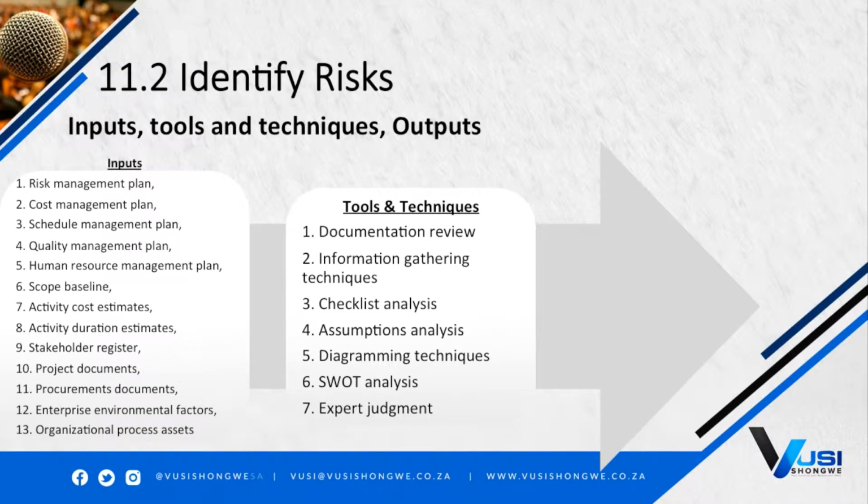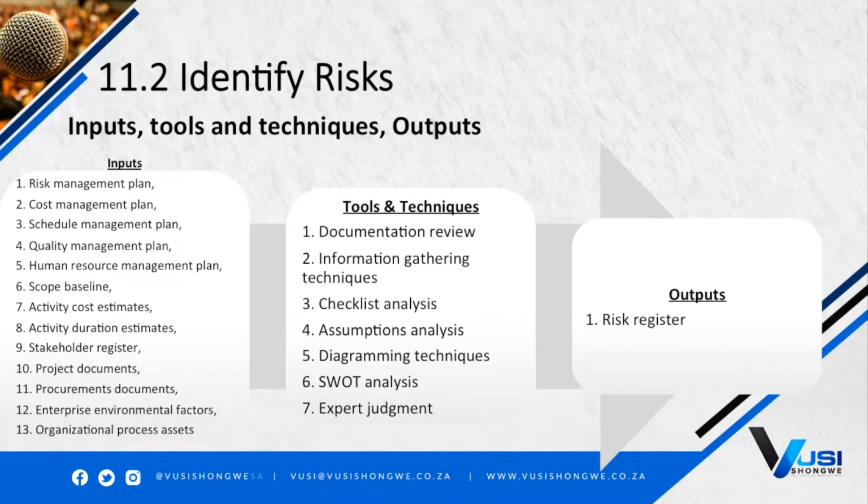Tools and techniques are documentation review, information gathering techniques, checklist analysis, assumption analysis, diagramming techniques, SWOT analysis, and expert judgment. The output is a risk register.